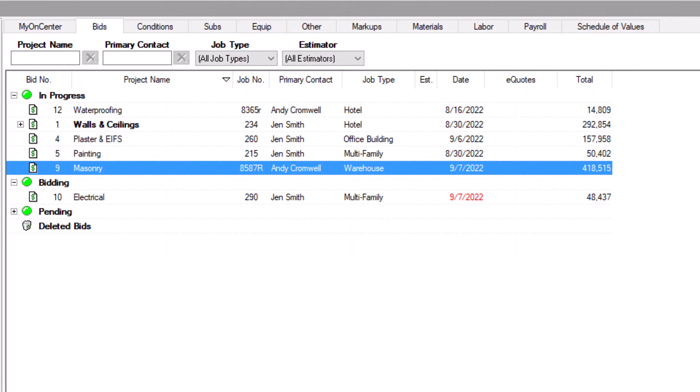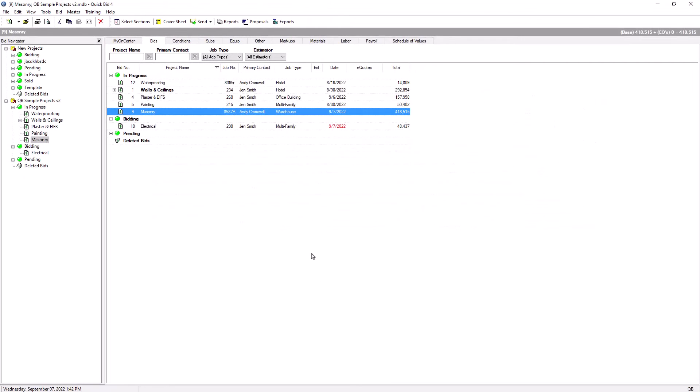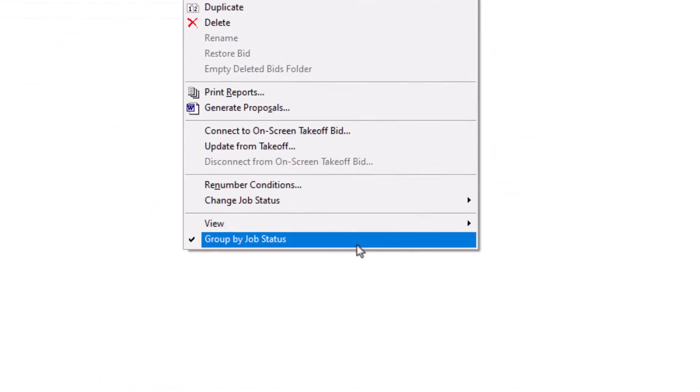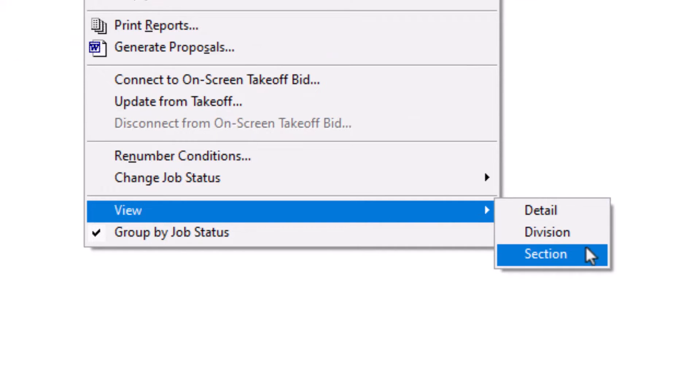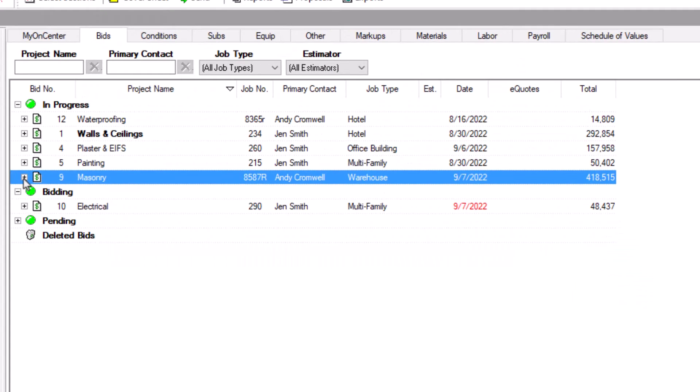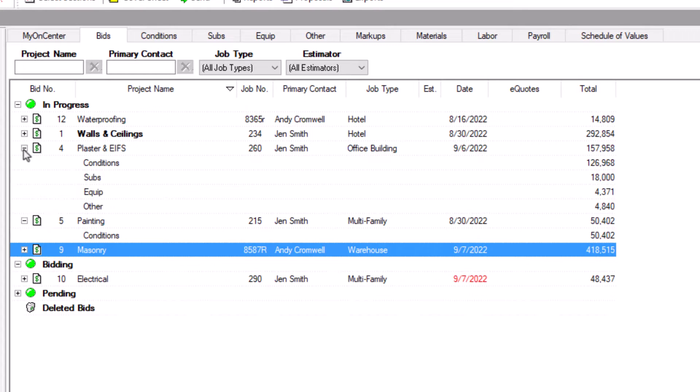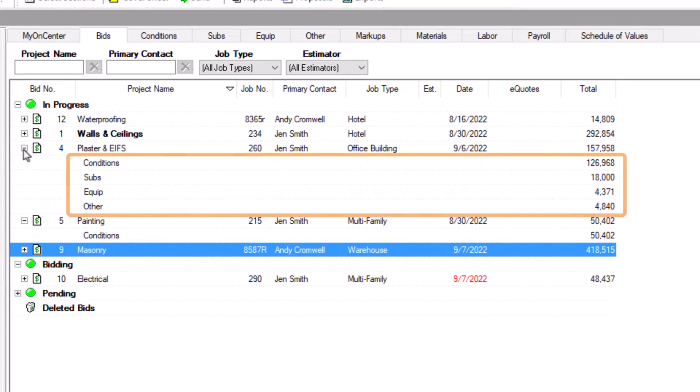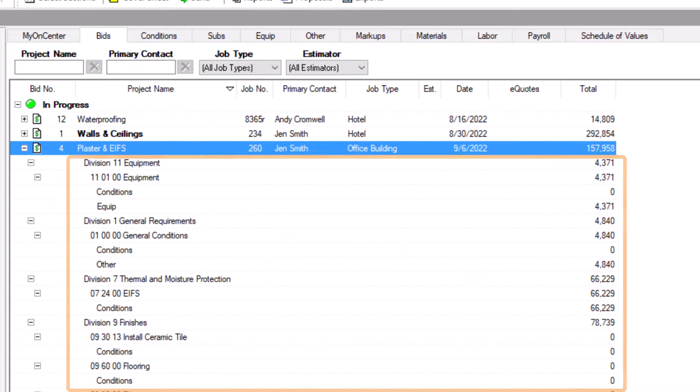The bids tab can also display more pricing details, making it easier to compare bids. Select view from the context menu to show detail, divisions, or sections. Detail lists the total of all conditions, subs, equipment, and other. Select divisions or sections to display the pricing details broken out by division, section, or both.